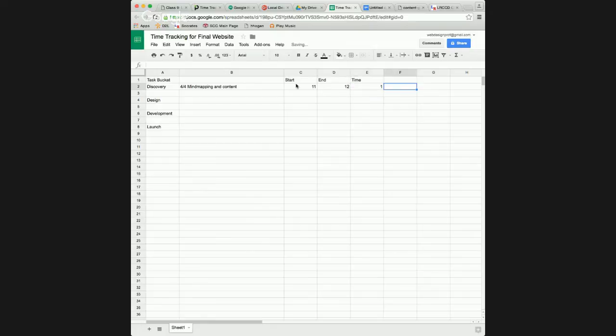You are not going to be able to estimate for proposals until you know how long your tasks take you. And every time you measure, you're going to get a little faster at it, and you're going to know more about what things are going to hold you up. Brian Bourne had a really good test. He's like, I'll take a job if there's only one thing I don't know how to do. If there's 2, I'm not going to take it. Because there's always an unknown in any project you take.